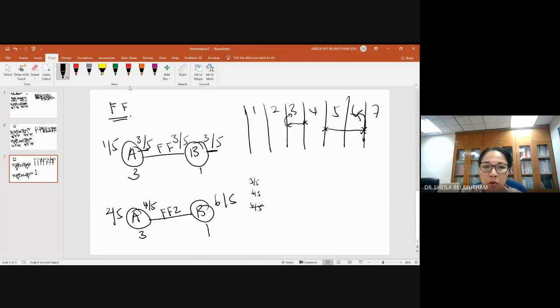If only 1, then the 4th you finish. Because there was the answer 5, the 4th finish is only 1 day. It shows the finish of the 5th, 1 day only. So for this 2 days lag, from the 4th extend it by 2 days, you stop here, it shows the finish of 6. So 6 finish, 1 day, so you will start also on the 6th. Okay, so 6 minus 1 day, you will start on the 6th. So here 2 days, finish to finish, 2 days. So 1 day, 2 days, it shows the finish of the 4th. Okay, so 4th finish minus 3 days, it shows the start of the 2nd.